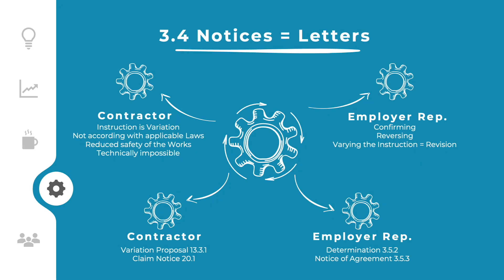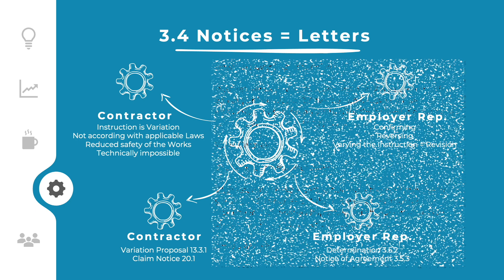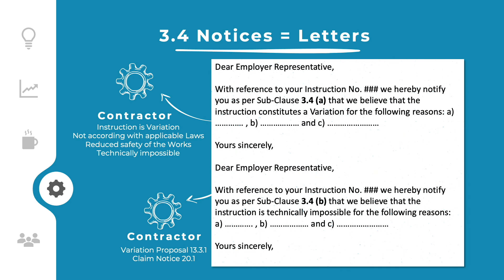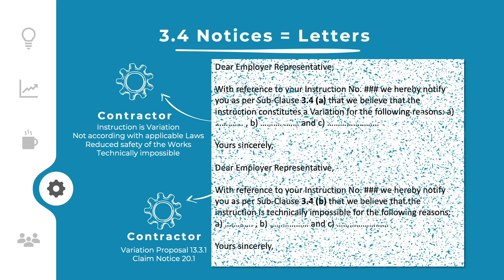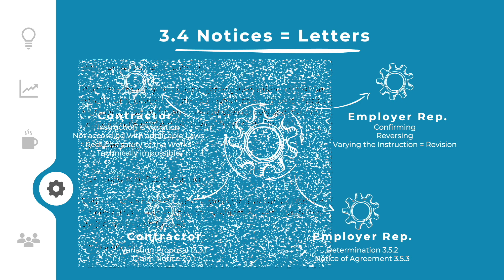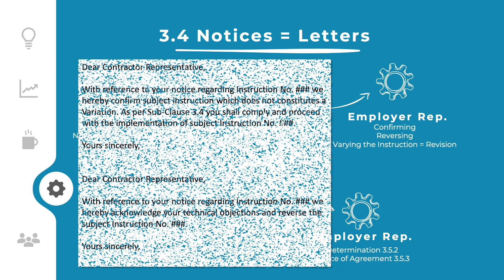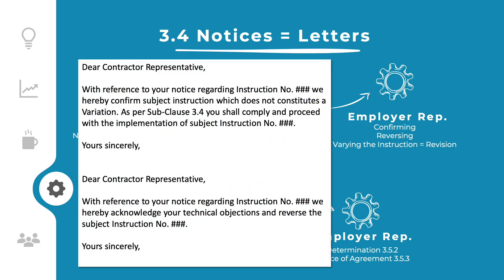The parties shall pay attention to their notification obligations in sub-clause 3.4. If the contractor believes that the instruction is a variation or has other objections as per sub-clause 3.4(b), then they have to send a notice immediately. The employer's representative shall, within seven days, respond to the contractor's notice.